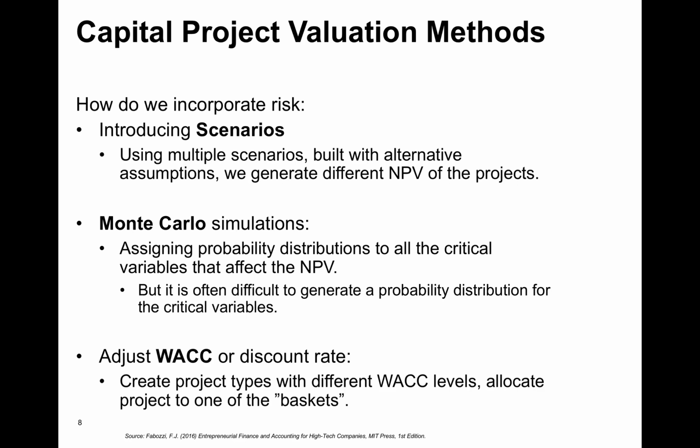What you would then do is try to calculate the NPV given each of the scenarios, and then give weights on how likely it is that each of the scenarios happen in the next years. And you can change those weights as you get more information.